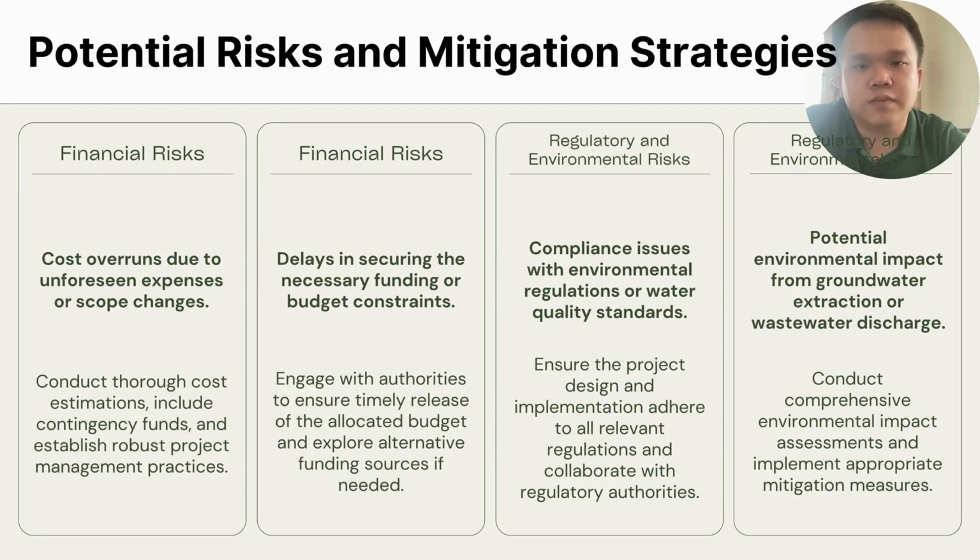Last is the regulatory and environmental risk. So we have the compliance issue with environmental regulation or water quality standard. Besides that, we have the potential environmental impact from groundwater extraction or wastewater discharge. So in my mitigation strategy to solve this risk, we can ensure the project design and implementation adhere to all relevant regulation and collaborate with regulatory authorities. Besides that, we can also conduct comprehensive environmental impact assessment and implement appropriate mitigation measures. That's all for our group.